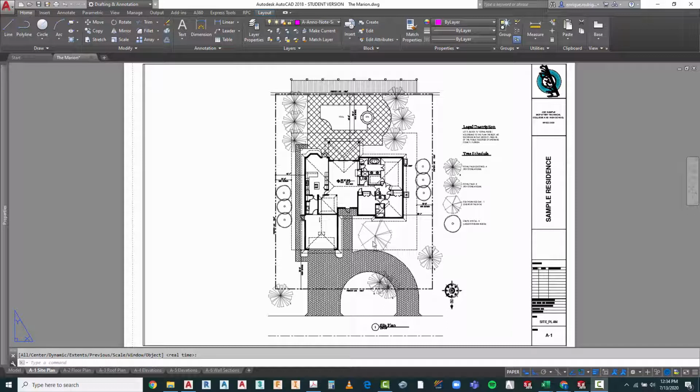Now at different phases of the design and during the construction, the amount of information needed to supply the different players in the construction process might vary. Of course, when you first start out, a conceptual design might be sufficient, but by the time you get ready for construction documents and submission for permit, you need to have a very, very detailed and documented set of drawings.